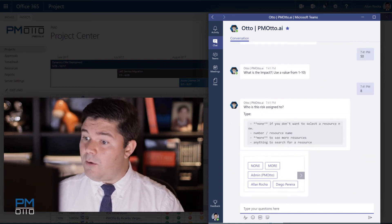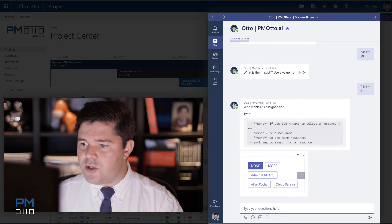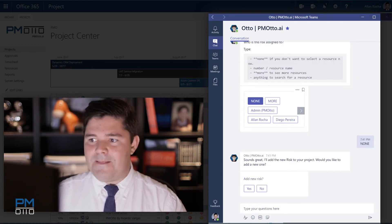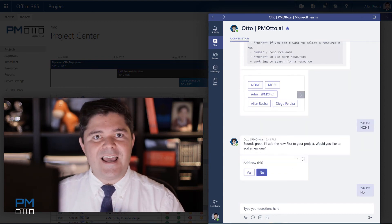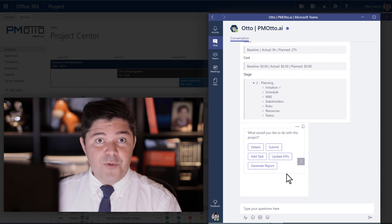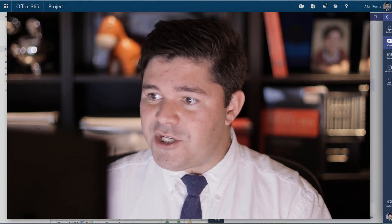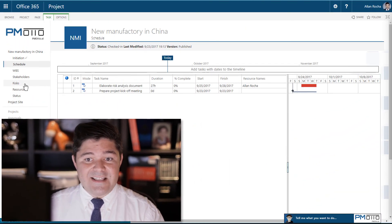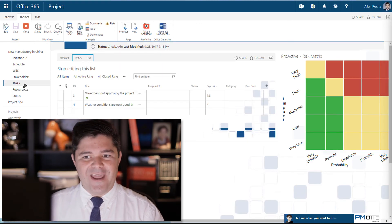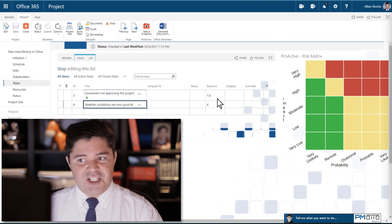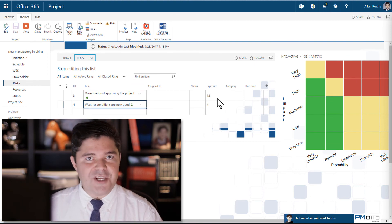Would you like to assign this risk to someone else? Not at the moment. But if you go to your project site, you're able to see all those risks included, registered, and connected to your project. You can just go to your project by clicking on the name of your project. You can access the risks page, which will load and show you exactly the two risks we just created with the exposure based on the calculations in my methodology.